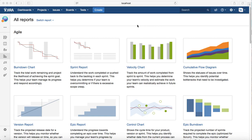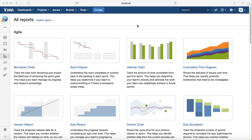This helps your team to manage progress and respond accordingly. For example, on day three of the sprint, if you figure out that progress hasn't been made much because of some blocker issue, then you can identify where the issues are and resolve them immediately in order for your team to progress further.